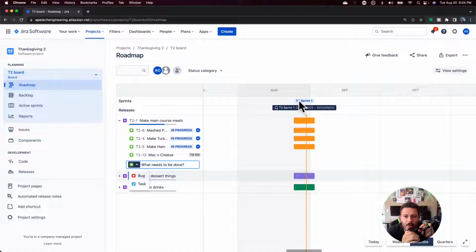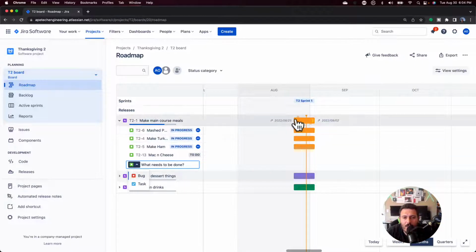date. And so the basic roadmap, you can, if you want to, move the dates around, but you don't really need to do that, because it is assumed that when your team accepts the work into the sprint, the bounds of the sprint, the time box of the sprint, is going to define when something can start and when something should be done, because your team has the autonomy, they have the freedom to self-organize and to basically go and figure it out. And this is just going to give you a very, very basic view.